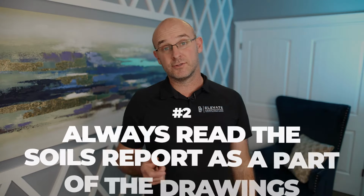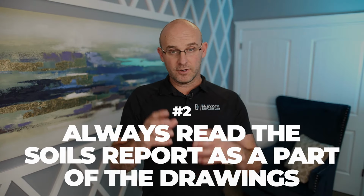And the second one that I'll leave you with, which some people actually forget to your own detriment, always read the soils report. That will be a part of the project exhibits, right? It'll be a part of the project documentation, but sometimes it doesn't automatically package in with the drawings or get printed with the drawings, and you have to reference it. So it's going to tell you what the soils are like, what the recommendations are, and how you as a contractor need to mitigate any risks, and how you can prepare the pad for the foundations. And it will a lot of times really educate and provide context for the structural drawings.